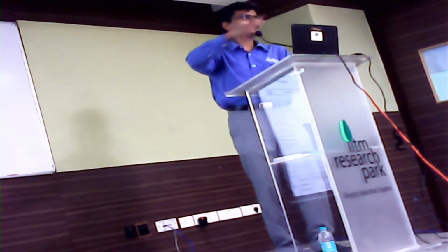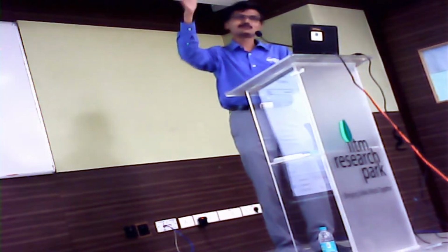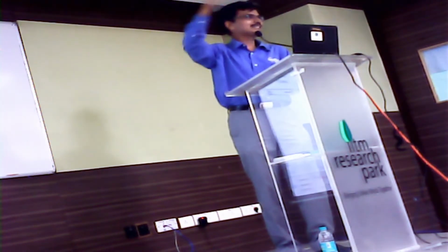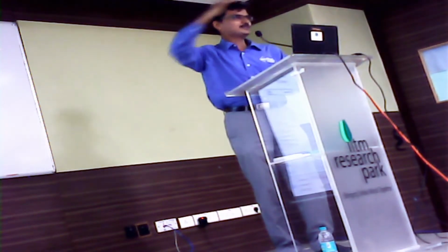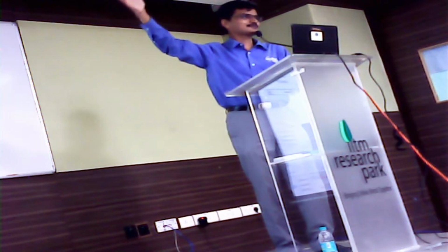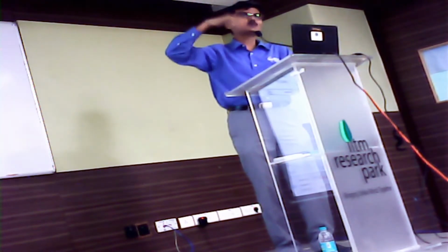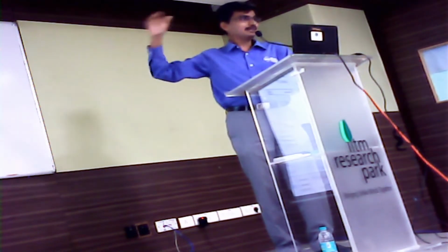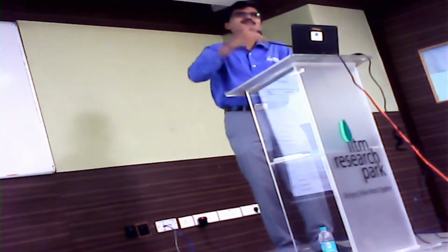To give you an idea, look at your team. Are they working from the same location or different locations? They may be more from one location or one city, right? So each city is having a different working time and holidays. Do you all agree? Which means so many base calendars should be created first. Once a base calendar is created, the next step is you need to say what is the default calendar for my entire plan. Which means when I enter a new task in this plan, what should be the default base calendar that should be selected?